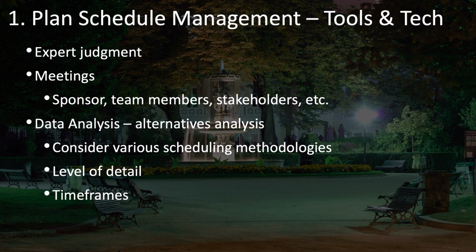You'll need to choose between different types of methodologies and different tools, and also, importantly, the level of detail that you have in your project schedule. You need to have enough detail that you can manage it well, but not so much detail that it's too much of a burden to keep track of it all. Just like breaking down the WBS into the appropriate level of detail that makes it most manageable, you need to follow the same principle here as you're putting together your schedule and its level of detail.